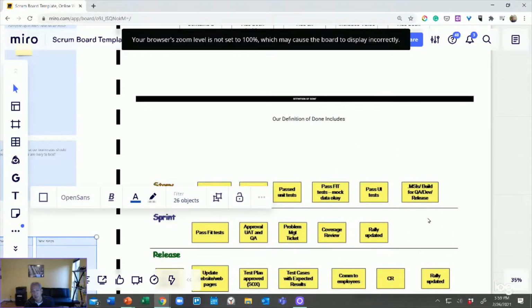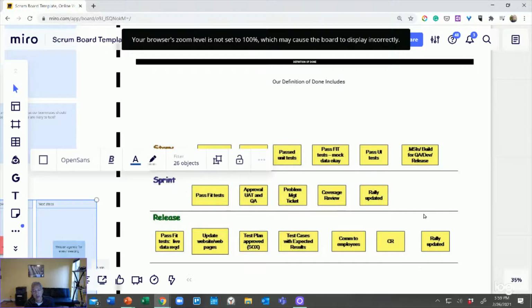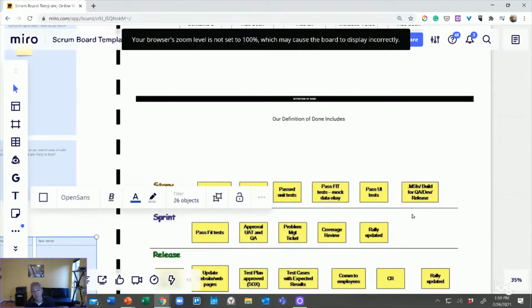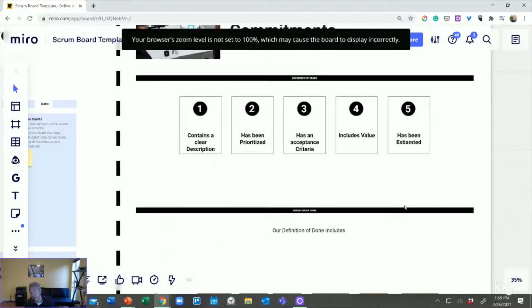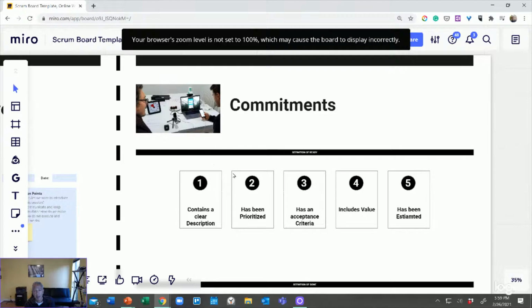that we try to expand it as much as possible. It might be that we have it at the sprint level, we might have it for the release, we might have various ways to define that definition of done, depending on. We might have a definition of ready. This is, by the way, not core Scrum, but the idea that we need to also align in terms of when is a product backlog item ready to be picked up by the team, by the developers.